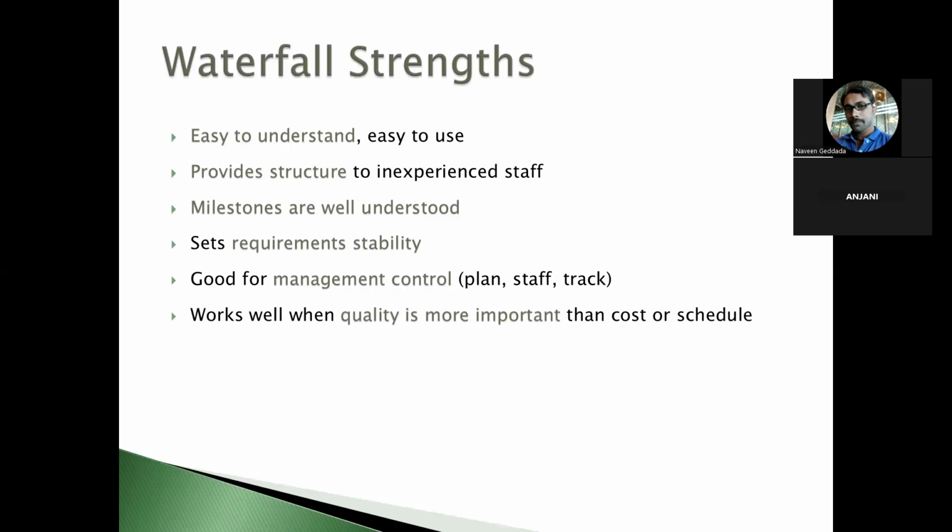And when the schedule is increased, the cost of the project will also increase, because both are sequentially aligned. Why will the cost increase? Because the development of the project has been extended from 6 months to 8 months. Whoever the resources are working on this project, they need to spend additional working days to implement the project. So their billing will be added, and that billing will be an additional cost on top of the earlier cost that was defined for the project.